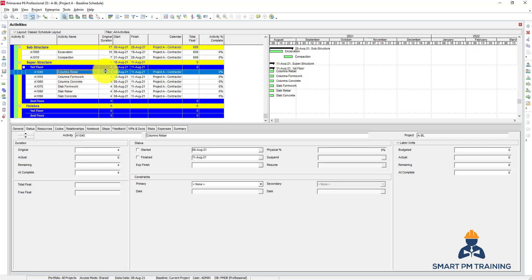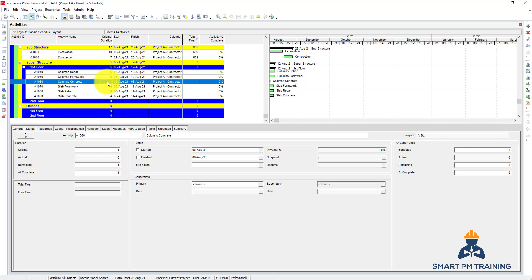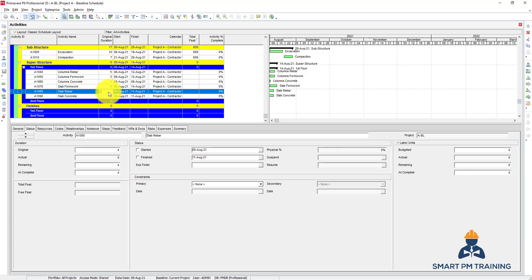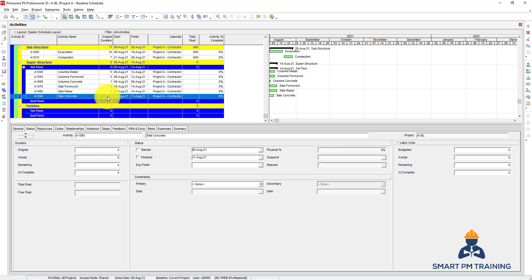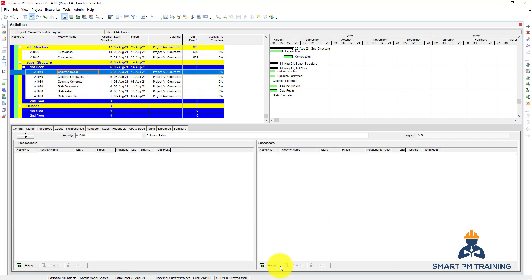For column-rebar I will make it five days, formwork five as well, column-concrete one day, slab-formwork six days, slab-rebar six days as well, and slab-concrete one day. Now let's link them quickly - I will go to relationships and choose a successor.